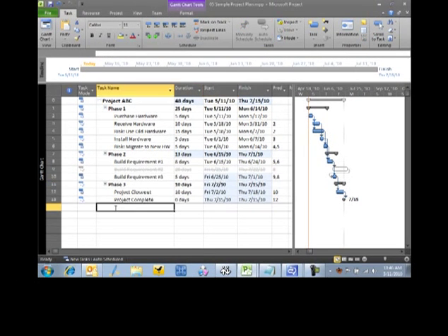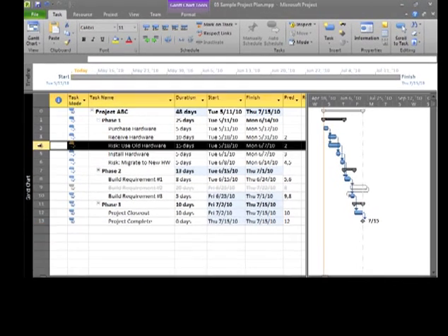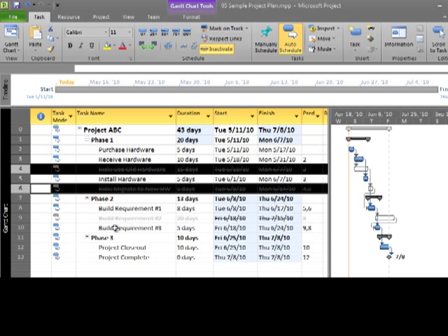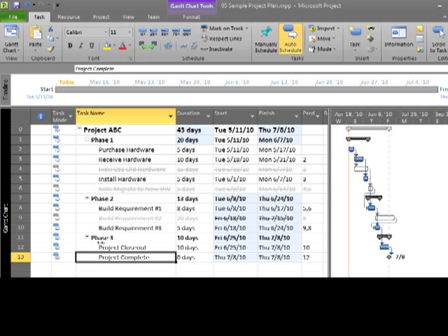So that's how inactive tasks work. There's probably a number of different scenarios that you might want to use it for, but I truly think the two best ways of using it is to automatically build risk into your schedule that you can then just essentially hide using this technology, and also if you want to retain a set of tasks in your project that you've de-scoped.